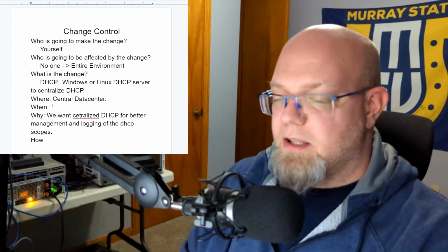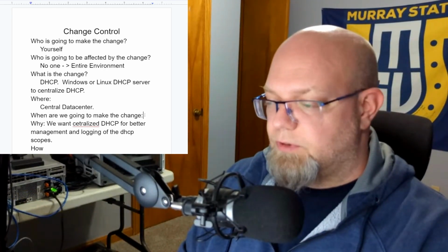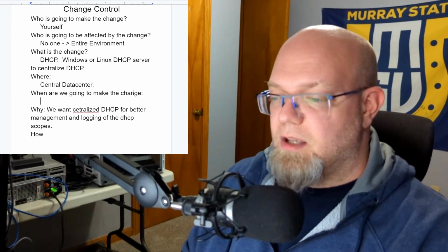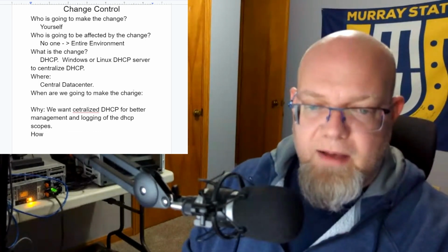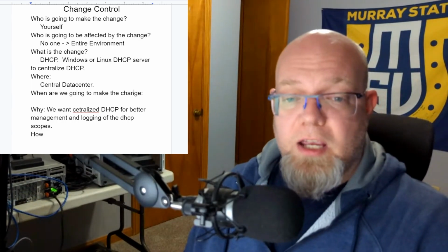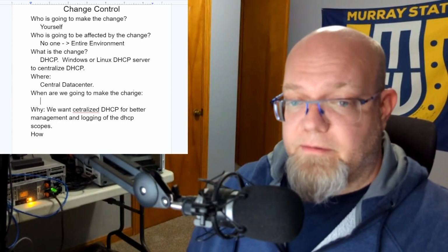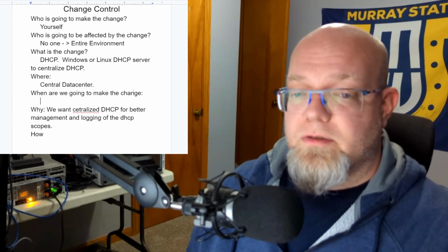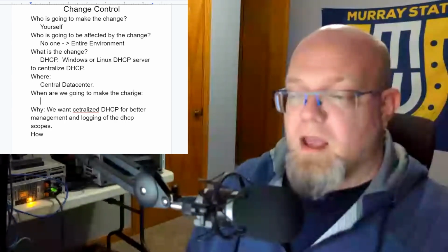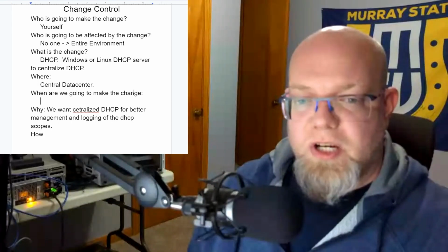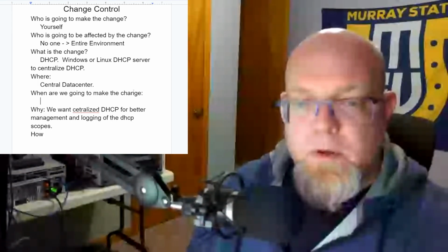When are we going to make the change? So this is important. So when are you going to make the change? This is important. You're going to have varying levels, or at least you should have documented varying levels of changes, whether those are non-disruptive, minor disruptive, major disruptive, total disruption. So, no disruption means you're going to change something so small and so insignificant, no one's going to notice.